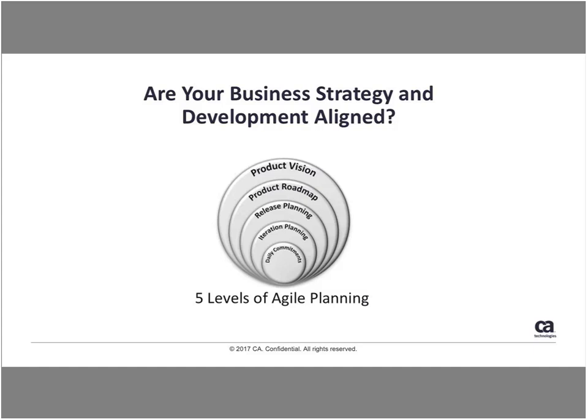So when we look at the Agile onion here, we look at the product vision, and I'm going to equate that to the Portfolio Manager items. So the product vision is 1 to 5 years, which equates to themes. Then you go down to the product roadmap, which is 2 quarters, and that equates to epics and initiatives. Then release planning to features, which is 1 to 3 months. Then iteration planning and user stories, which is 2 to 4 weeks. And then the daily commitment, which is tasks. So we need to look at a way that we can support and connect these levels of planning in Rally.